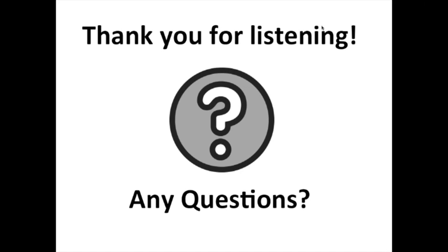And this is why, but it's a very good question, because this is why it's good to have a quality check. After 2 or 3 months, send it to somebody. It could be an M&E person, or it could be a consultant if there's a consultant doing the M&E, just somebody, just to make comments on it about whether it's provided the kind of information you need. But I think all the organisations that started with this, because the harm reduction projects I've mentioned throughout these 3 webinars, they were all new to advocacy logs, and all of them after 3 or 4 months had got it cracked. They'd found out, they got into a rhythm, and they realised there were certain things they probably didn't need to record. But there are key moments that clearly needed to be noted down.